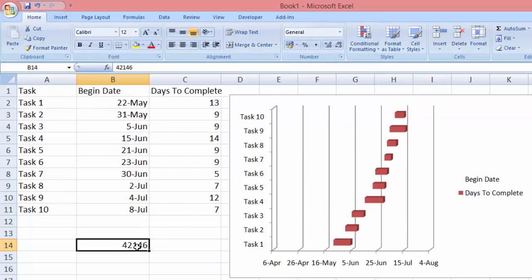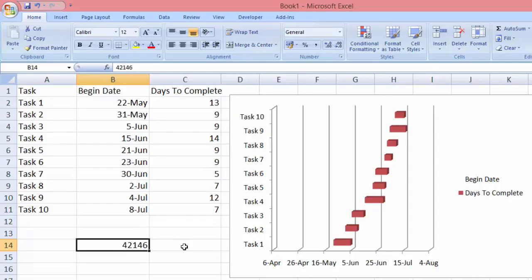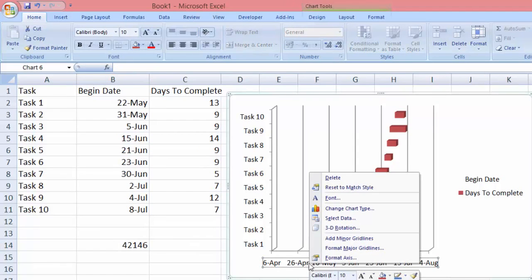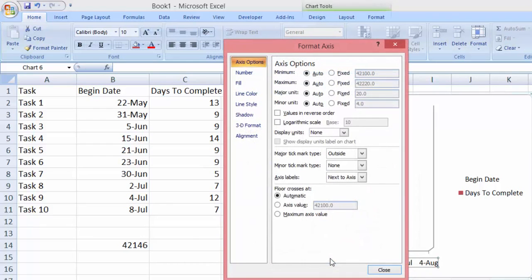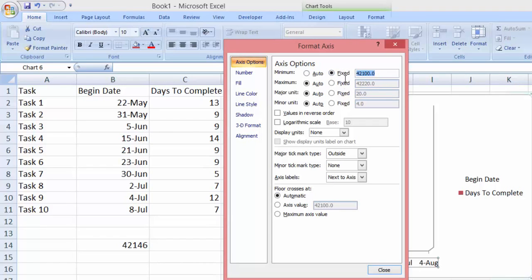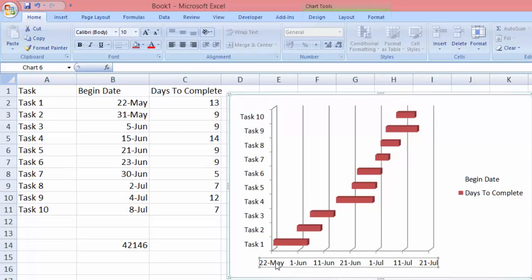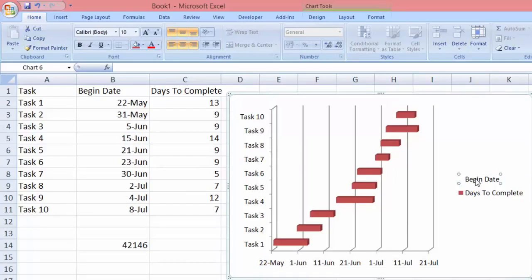So what we need to do is go back to the chart, right-click, format axis. You can see this bunch of numbers over here. Let's just click this fix, check it, and type in the date here, which is the set of numbers which we got: 42146. And then click close. Now you can see the chart starts from 22nd May right, and you can delete this one.